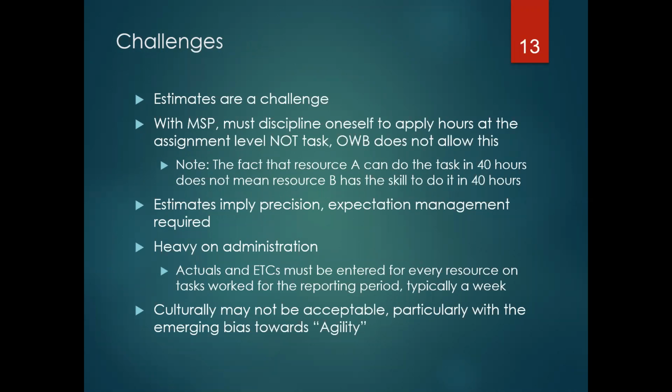As I mentioned with MSP, you must discipline yourself to apply the hours at the assignment level, not the task level. And as I said, OWB does not allow this. And the note that I would say is that the fact that resource A can do this particular task in 40 hours does not mean resource B has the skill to do it in 40. In fact, they may have the skill to be able to do it in 20.